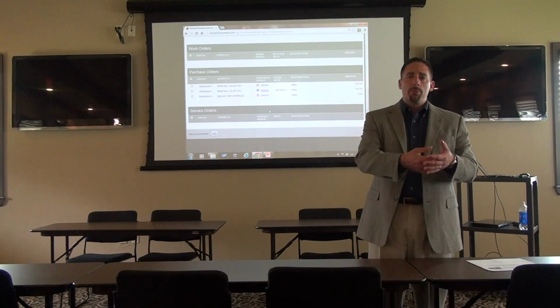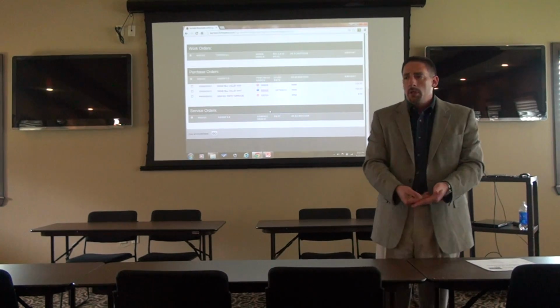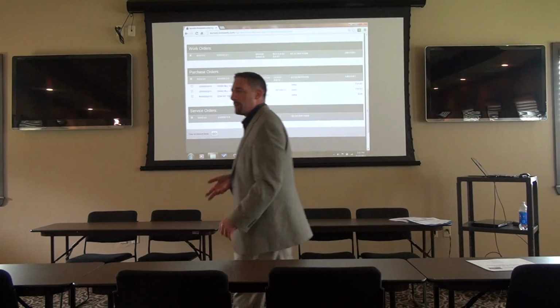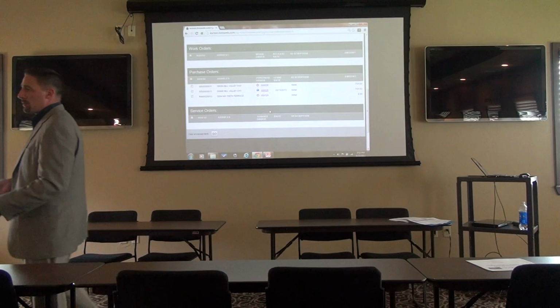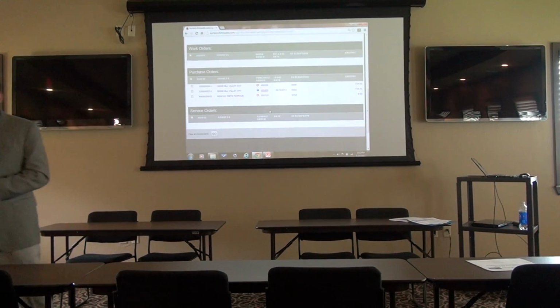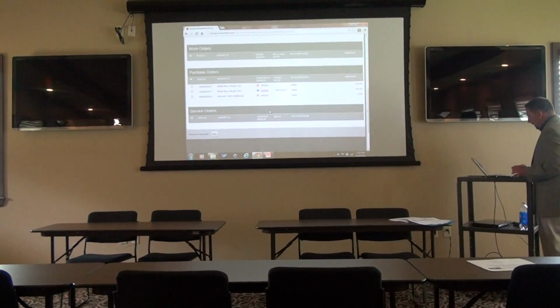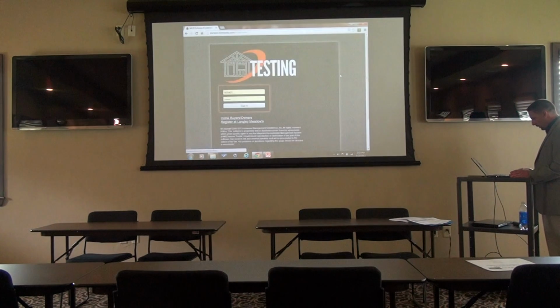Once you get your work order, purchase order, no more options can be selected for things that you offer. So you want to hope that the buyer picks everything in the beginning, but you have a lot of spec homes out there. So we don't want to just release them all in the beginning. We want to make sure your order lead time is reasonable. And then you'll be able to see it on here. So let's log back in as the work order vendor.